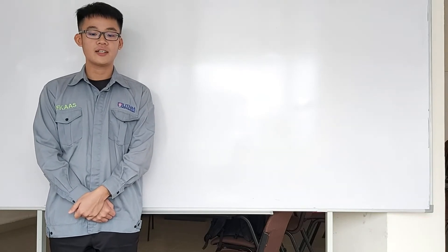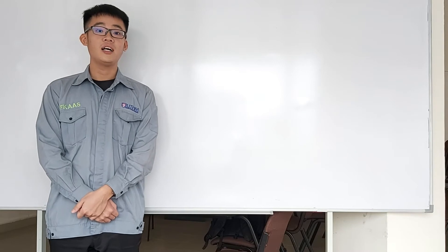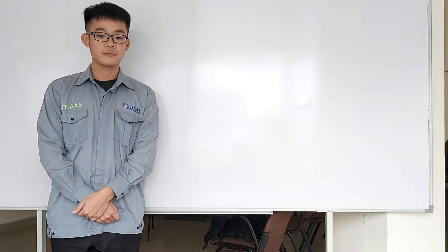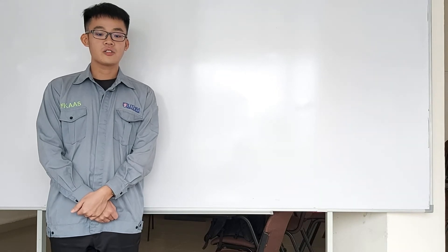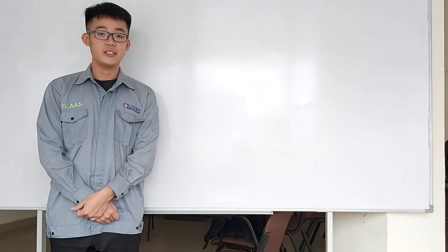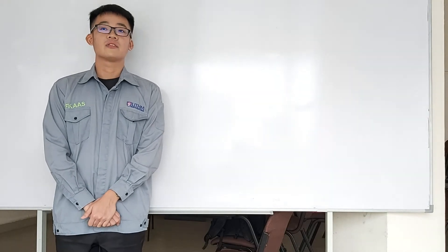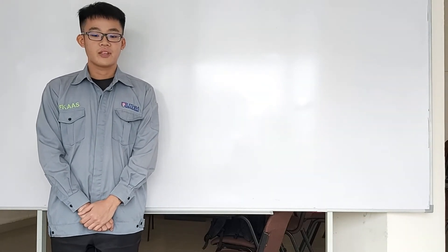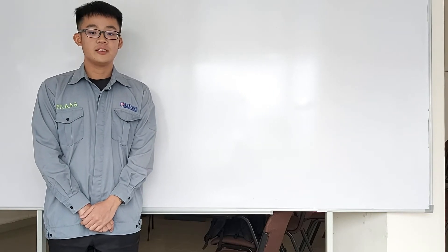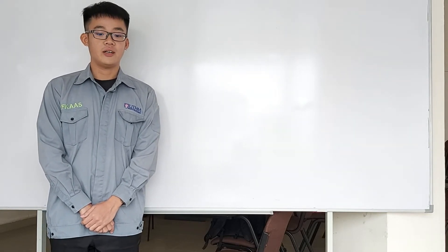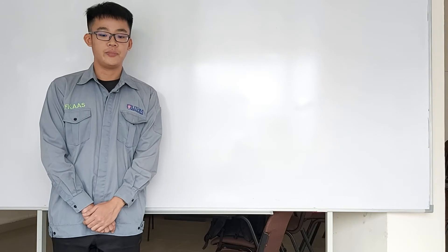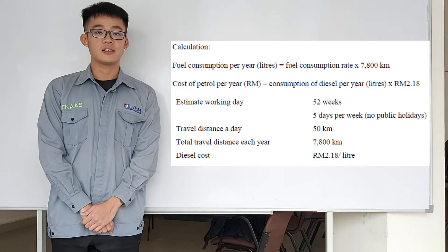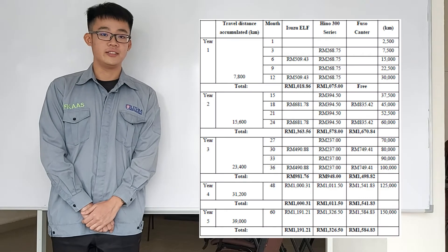For periodic maintenance costs, we need regular car maintenance to keep the vehicle running smoothly and reduce problems. The cost normally depends on the vehicle itself. We obtained the service costs from the car manufacturer's website. Assuming a total travel distance of 7,800 km per year, the service cost for each vehicle is calculated and tabulated in the table.